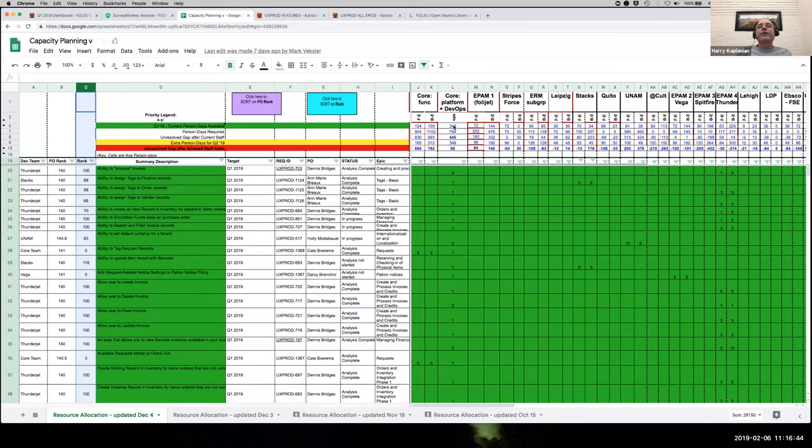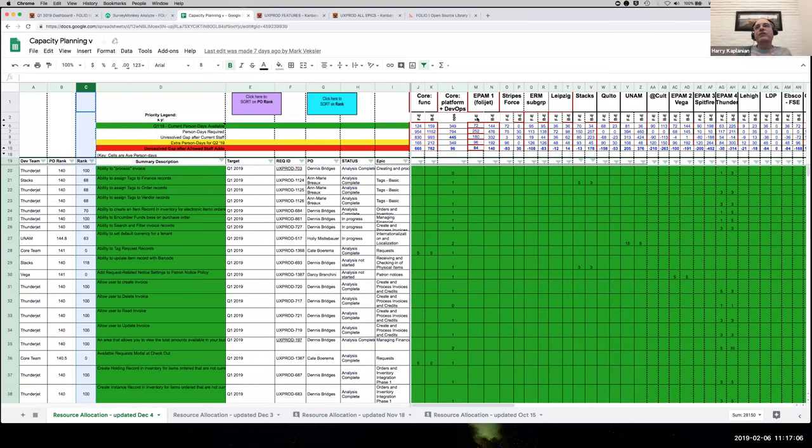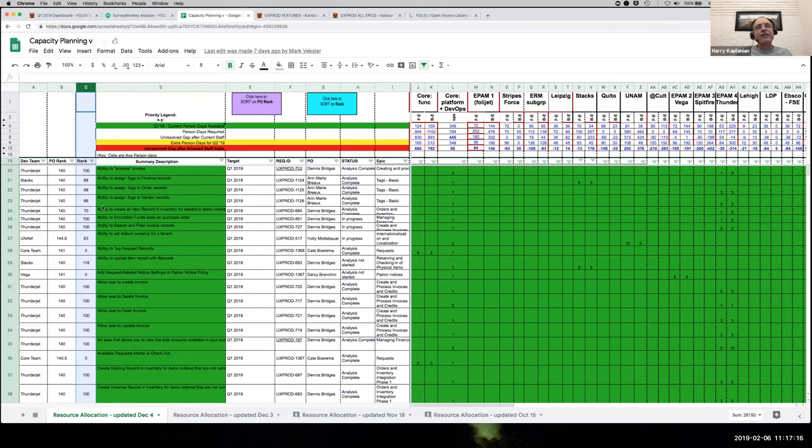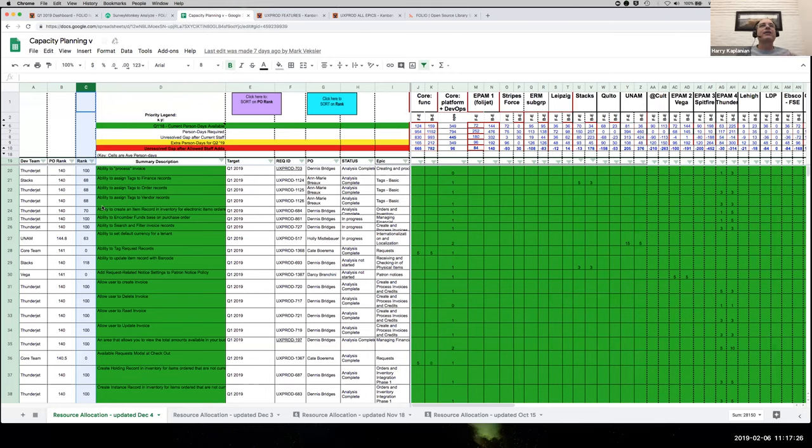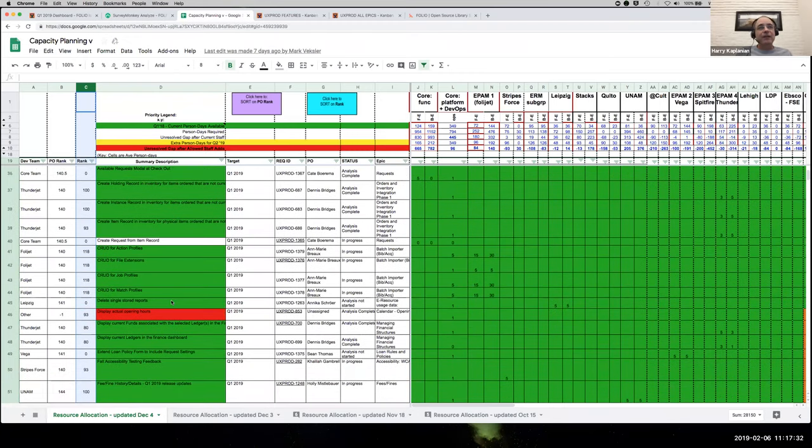And we also pull in those estimates into the spreadsheet. And when we take those estimates and we superimpose all the development teams that are currently involved within the project, along with the number of days of time that these development teams have. And these are broken down into front end and back end developers because some developers really focus on the user interface elements where others really focus more on the back end architectural type elements as well. And by providing breakdowns for all these features that are broken down along back end and front end, we're able to apply these across the board as best we can to librarian provided priorities, taking into account technical issues or architectural issues. And we're able to see and relatively easily calculate or come up with reasonable estimates as to what gets done. And so everything that's green here is what's being worked on in the current quarter.